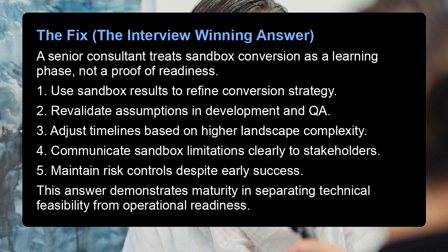A senior consultant treats sandbox conversion as a learning phase, not a proof of readiness. 1. Use sandbox results to refine conversion strategy. 2. Revalidate assumptions in development and QA. 3. Adjust timelines based on higher landscape complexity. 4. Communicate sandbox limitations clearly to stakeholders. 5. Maintain risk controls despite early success. This answer demonstrates maturity in separating technical feasibility from operational readiness.